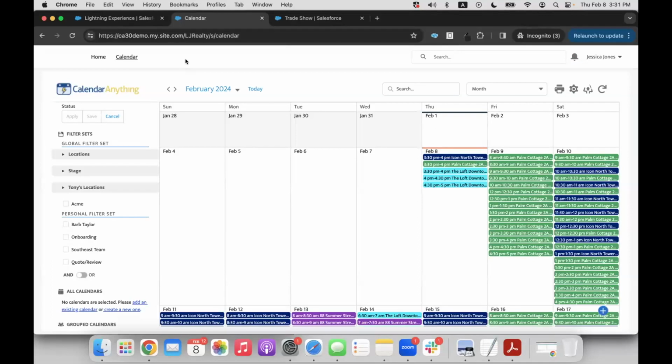And then just one thing I want to call out if you're not watching chat, Mel actually made a really good point about what Lena was just demoing earlier around when is it appropriate to limit the fields in Gantt view. And my answer back was, it really matters how many users are actually using Gantt view. If you have users that are heavy Gantt view users, you absolutely want to limit the fields, because most of the time there's hundreds of fields, and that will slow load time. So anytime you can, definitely make sure that you're limiting the fields if you have Gantt view users or swim lane view users, or day view grouping.